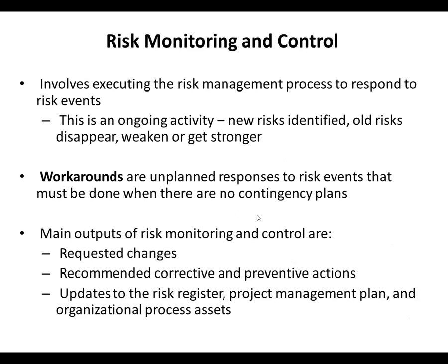The last process is risk monitoring and controlling, which actually helps to mitigate the risks if you do it properly. This involves executing the risk management process to respond to risk events. We are trying to identify new risks, looking at change requests as well, while recommending corrective and preventive actions for the current risks. We identify new risks while carrying out the project as well.